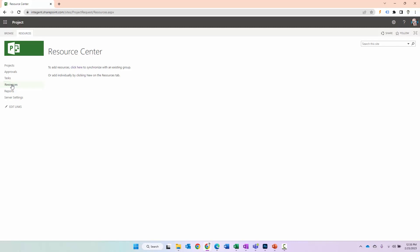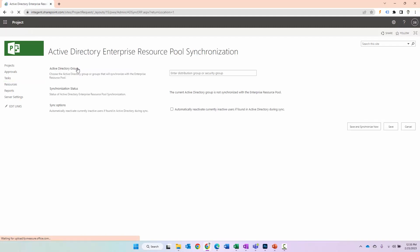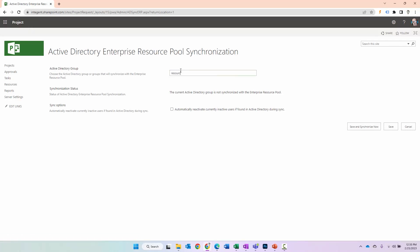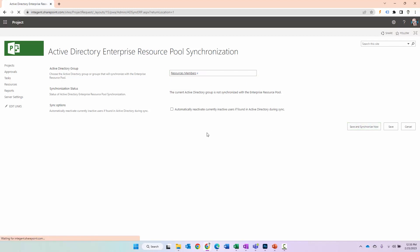They need to be added to the enterprise resource pool. The easiest way to do that, if they happen to be resources that are set up in the system as users, is to synchronize with an existing group. You can see Active Directory enterprise resource pool synchronization. I can specify a resource group in here. I have a resources group created. When I have that specified and selected, I can click Save and Synchronize Now.